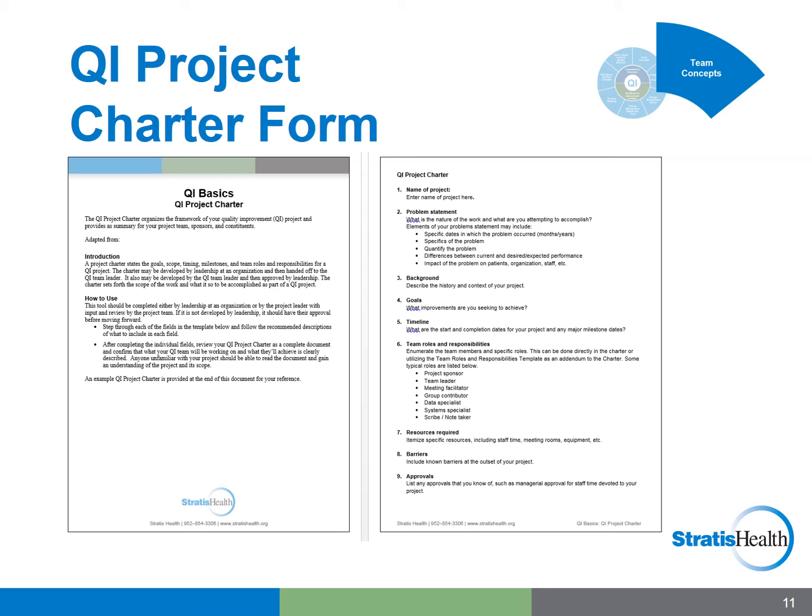A good project charter is a written document that is clear and concise. Charters should not contain pages and pages of information, but instead should focus on the key elements of the project. Additionally, the charter should be kept in a place where it is available to everyone involved, because it can help the team stay focused and avoid expanding the work beyond what the project charter describes, also known as project scope creep.